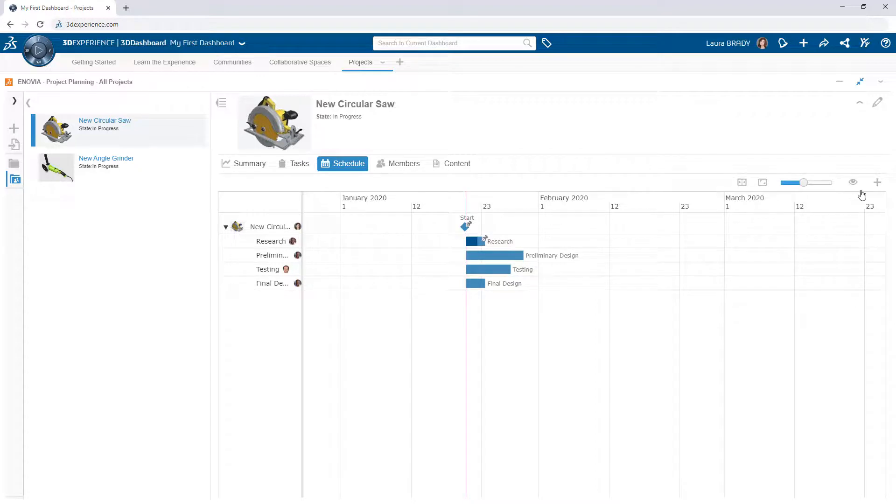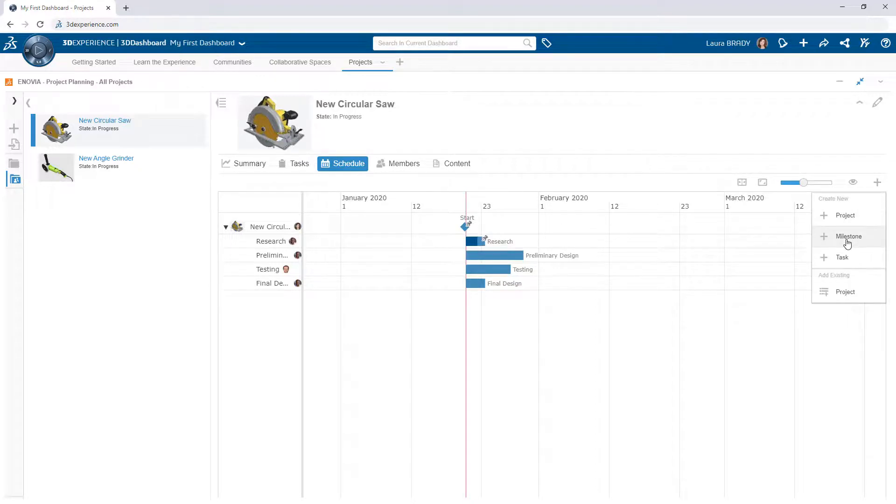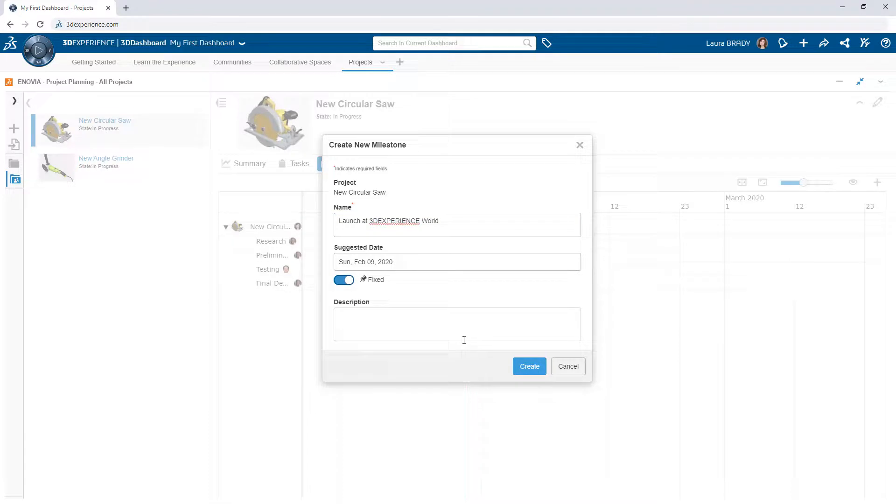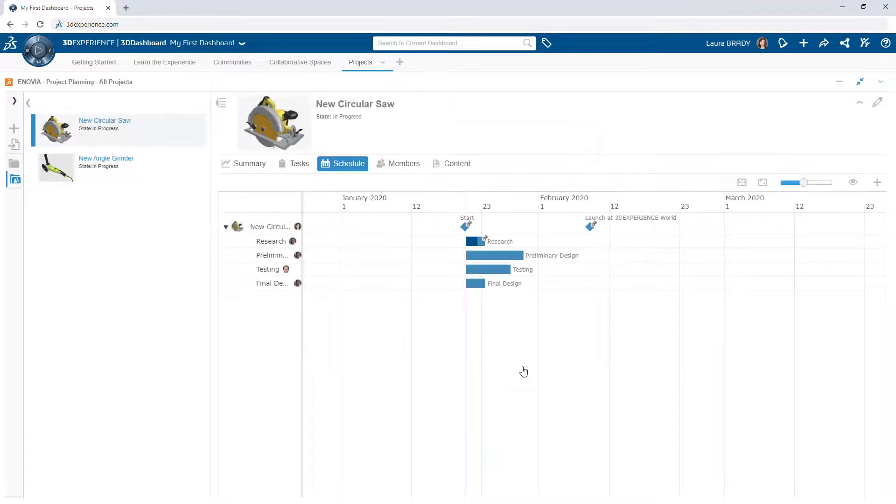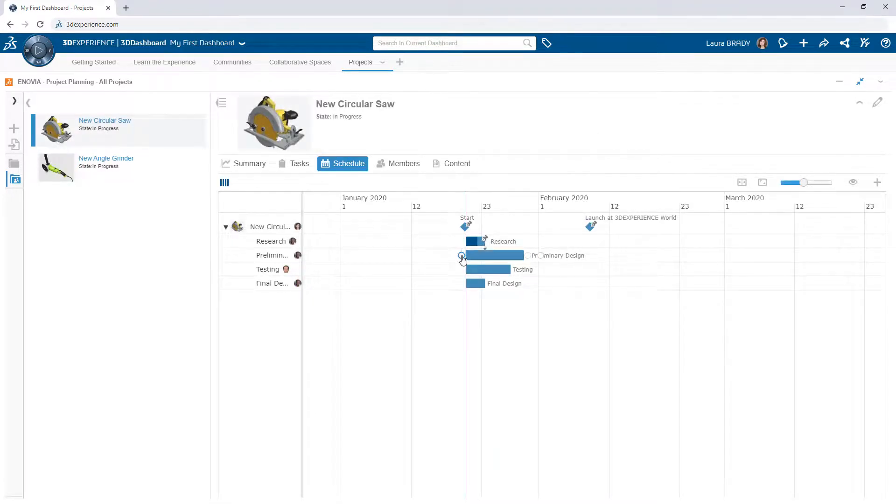Visualize and iterate on the project timeline in the Schedule tab. Create milestones and drag and drop between tasks to create dependencies.